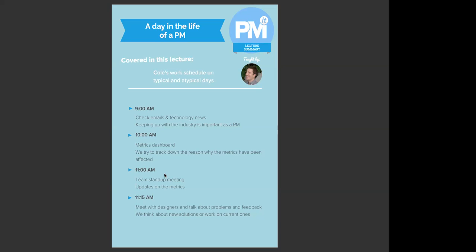We took on 50 story points. We had this number of developers. We were able to finish only 40. We couldn't finish 10. Why couldn't we finish it? Okay, we thought the story was simpler. We should have broken it down into further units so we can spread over extra sprints. Or something came up that just messed up the whole sprint cycle. What was it? We raised a spike to check and find what it was and find a solution, and decide to reintroduce it back into the next sprint.